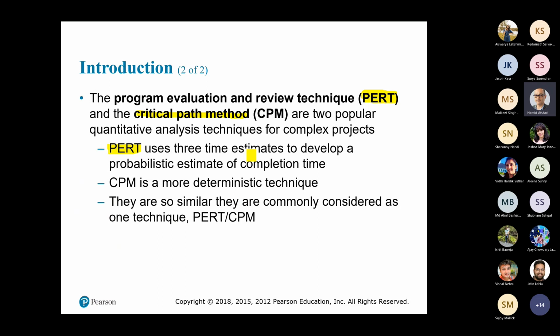You would say it may finish as early as 1 hour, it may finish as long as 5 hours. And on average, in previous tries, I could finish it in 2 hours. Okay, so you have 3 times, and we are not sure how long this time would take. Then you need to use PERT technique. Okay, so PERT uses three time estimates in order to find out how long it would take to complete the project.